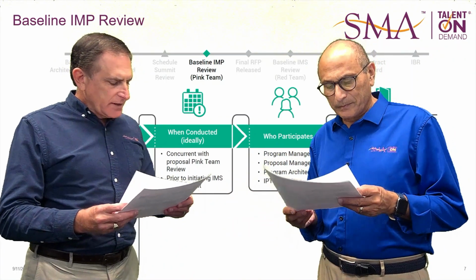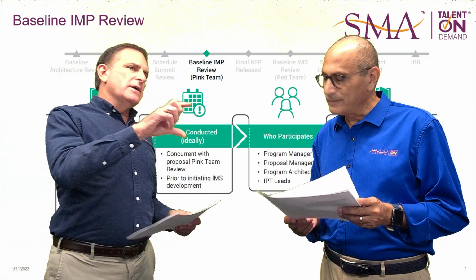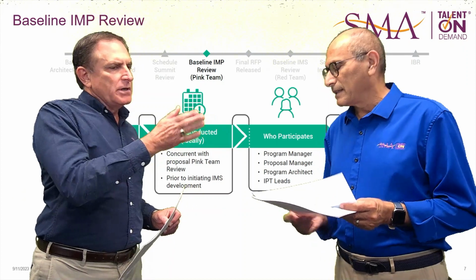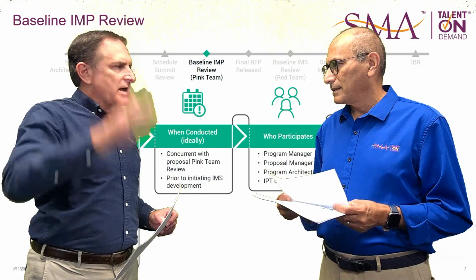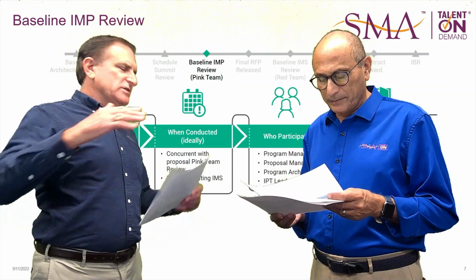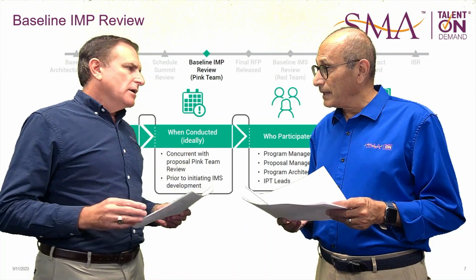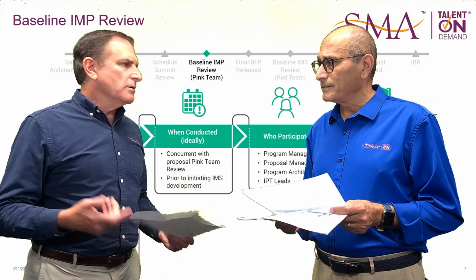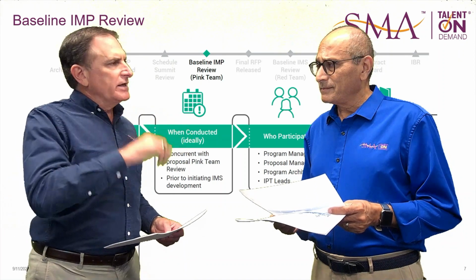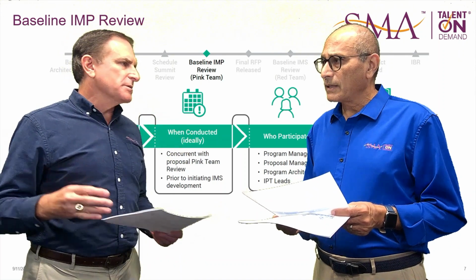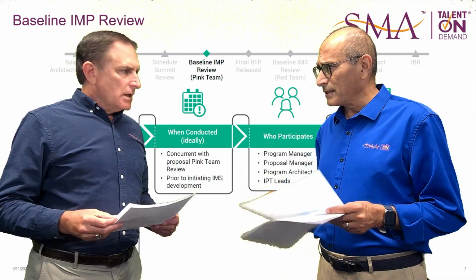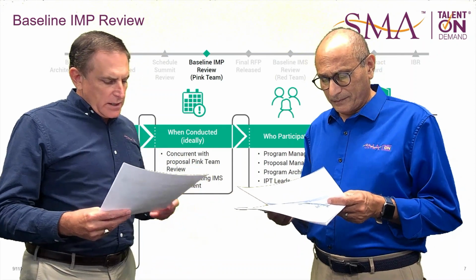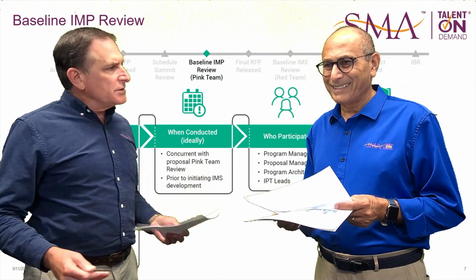Okay. Significant accomplishments. If you look at key events like a PDR, the significant accomplishments are those things that have to happen in order to get to that event. So it's a tiering of milestones. And then each of those milestones has accomplishment criteria, which are another set of milestones that get to each of the major accomplishments. So now you're starting to develop a little bit of logic. Exactly. A couple of other things are your verb definitions, and again, that's really important.